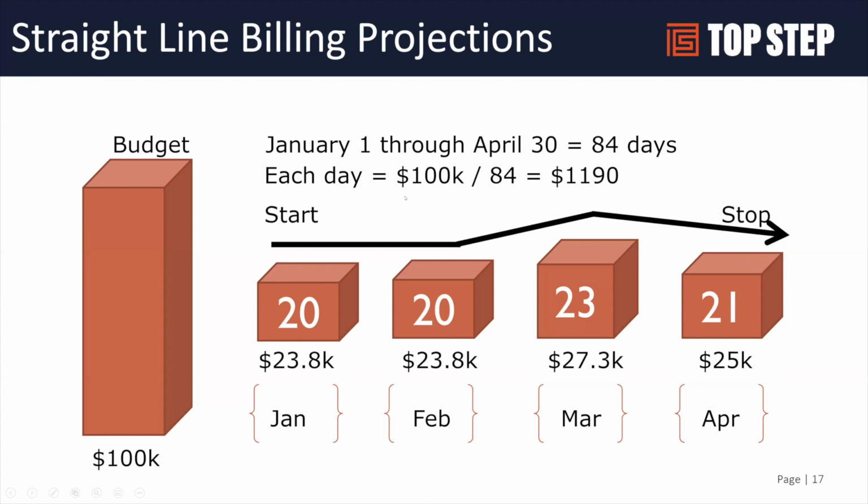The other thing to think about with projections is the start date. So when I think of projections, I think of the future. So we set it up to go this week plus 365 days. And that will give you the ability to always be looking forward and not backwards. And then when you're combining actuals plus booked or actuals plus assigned, you don't have a chance of actually double counting any data.